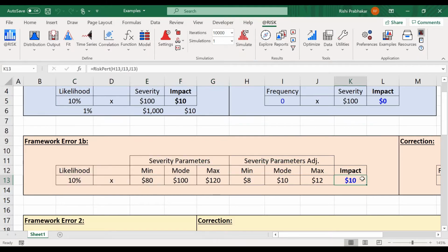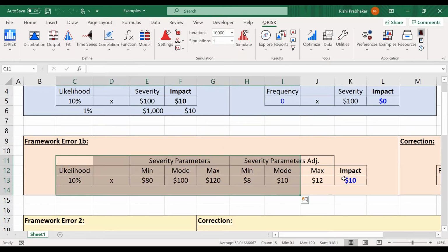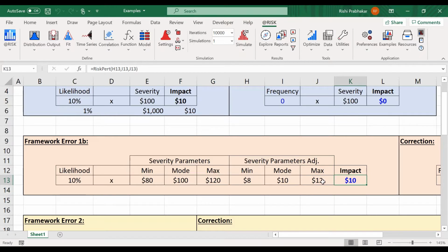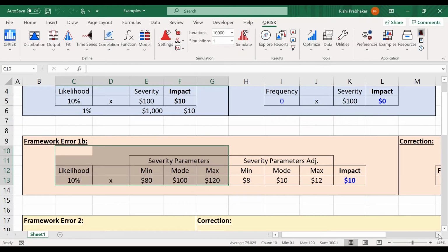So when the model that your great knowledge has gone into comes out with numbers between $8 and $12, even though it should be 0 or between 80 and 120, this is the reflection of you, but not really. So you're being punished because when this event actually occurs, it's never what the model said it was, even though you knew the right stuff.